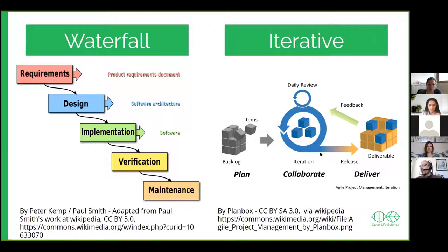And then you do these sprints, or you aggregate these tasks into milestones. And once each milestone is completed, then you reach a stage where you have a first release or a prototype of the thing that you're trying to accomplish. In the case of your OLS project, it can be a milestone. For instance, you have a website to build, and you can think how to break that big task into smaller chunks. The first article that you write could be an example of a first deliverable.